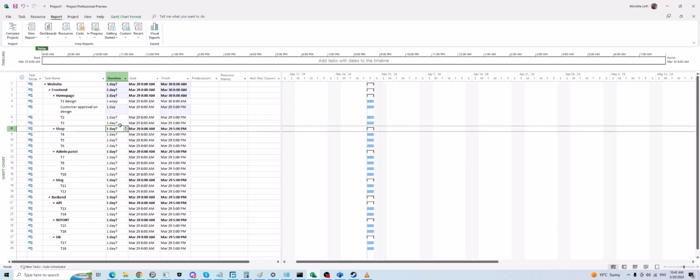You had to do all the calculations with your hand, and it was a very, very time-consuming process. But here in the software, for example in Microsoft Project or any scheduling tool, it's very simple. You just need to define the duration, resource, and also define the logic and link between tasks, and the tool automatically generates the project plan for you.